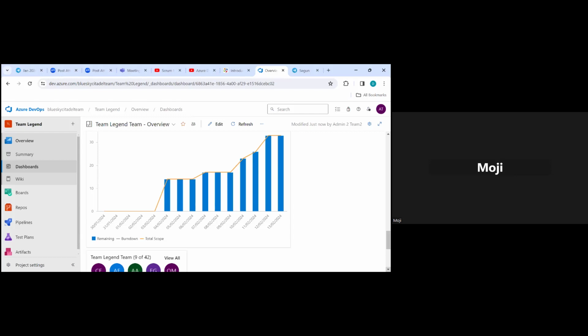it depends. You can start on Tuesday or another day, but once you started with your sprint 0 on a Monday to a Friday, 10 days, the next one has to be Monday to a Friday, 10 days. You can't say, oh, this one we did Monday to Friday because the team members were not around, we couldn't do the next one on a Monday, so we shifted it. No, it's fixed. It's a fixed meeting. So if you don't do your planning on a Monday, the team has lost a day. But you still have to set your board to start from Monday to Friday, 10 days.